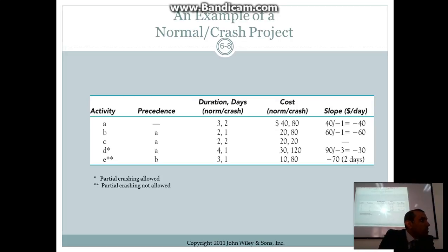And if you crash activities, which activities do I need to focus on? Sam? Two keys, yes. The critical path activities and the least expensive resources. Makes sense. Because if you focus on the critical path, as we said before and I repeat,